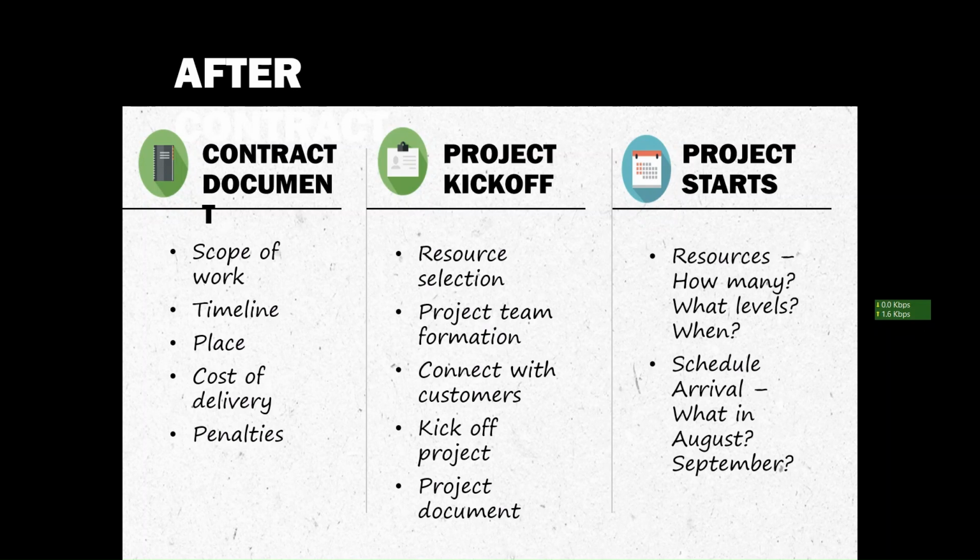Then the penalties if it is not meeting the timeline. What are the penalties? All those things will be ready, and both the parties will agree. They will sign the document. Once it's approved and finalized, then only the project kickoff will happen. In project kickoff, resource selection, project information, connecting with customers, then the kickoff meeting will happen and the project will be kicked off, and all the documents like SRS will be prepared after this.